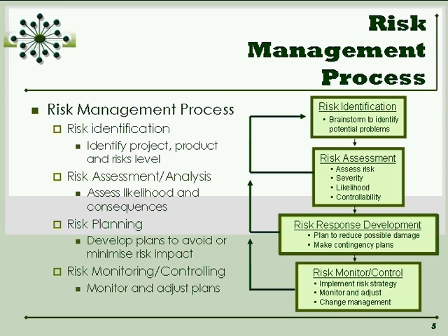Then after you have this list of risks, you analyze the risks themselves. What's the likelihood they're going to occur, and what's the potential impact? Then you plan on how to avoid or minimize these risks. And if you can't avoid or minimize these risks, how can you mitigate or minimize their impact upon the research or upon the study as a whole?